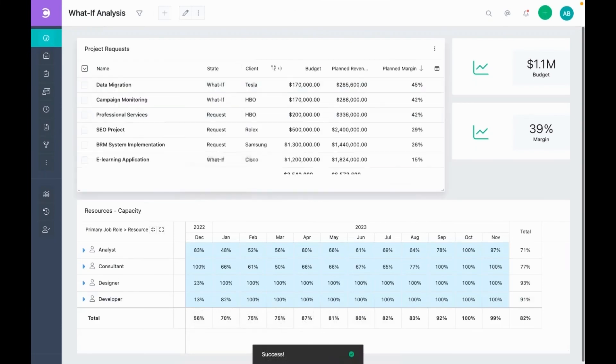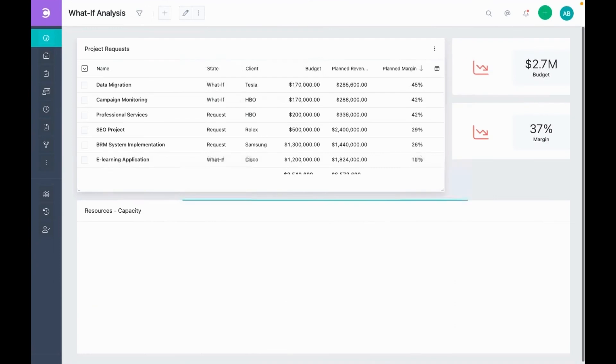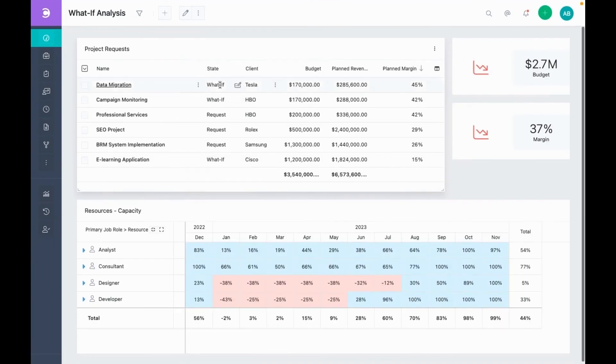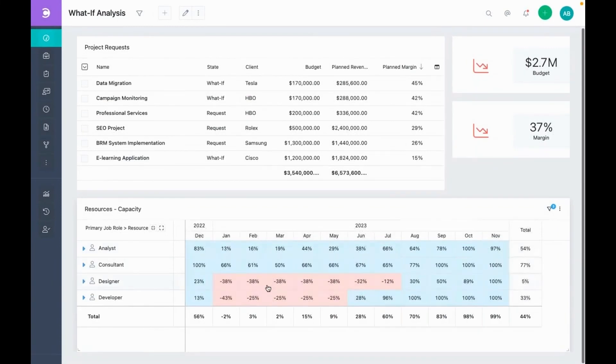Let's now refresh the dashboard. We can see that it's not good as the budget has been exceeded. The margin also has dropped below our threshold value. Also, we do not have the capacity to execute these project requests as can be seen from these red cells.